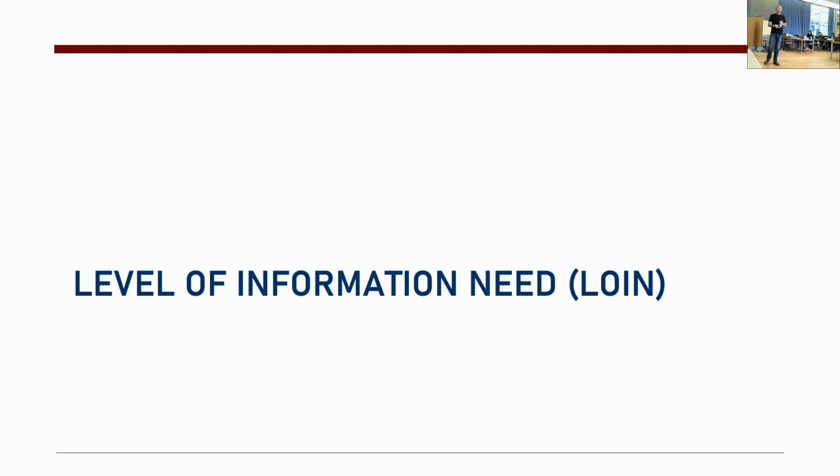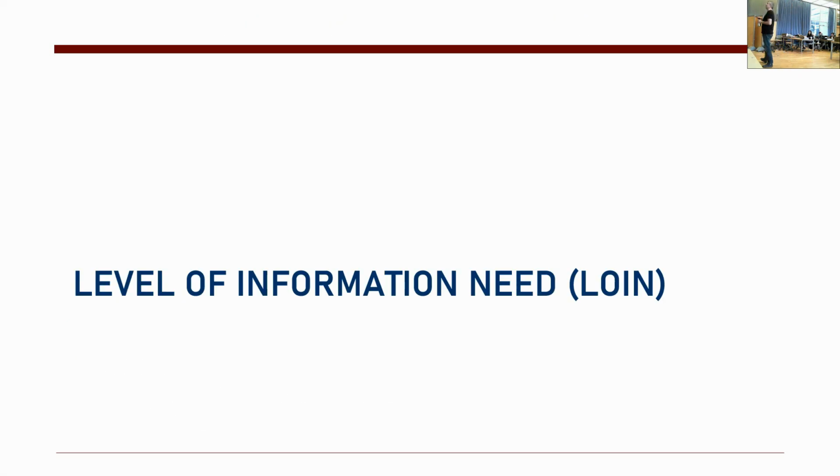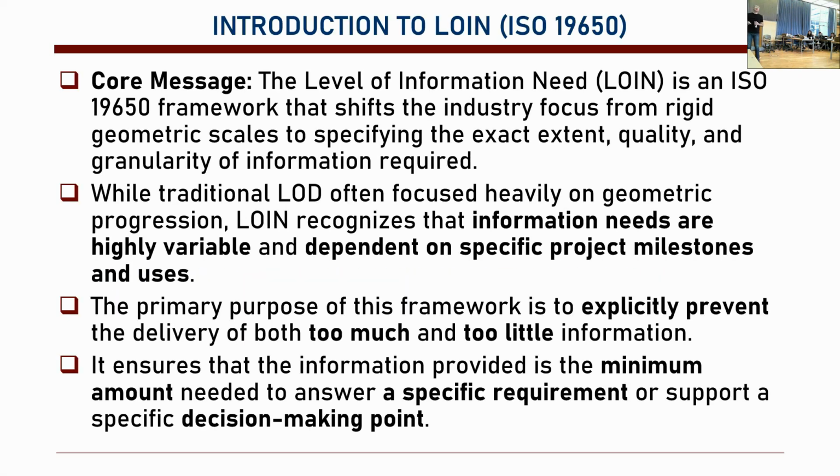Now, the next thing is level of information. This is the last part. Level of information need is something that was described in ISO 19650. The reason that it was published and described is because in the past, people were asking for higher LODs at earlier stages, or people were preparing documents that looked like higher LOD, but it was not the right time.